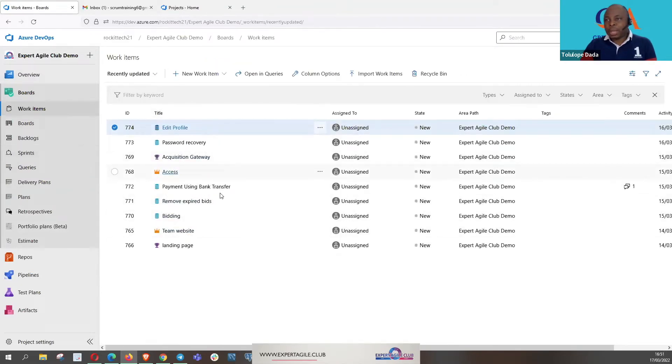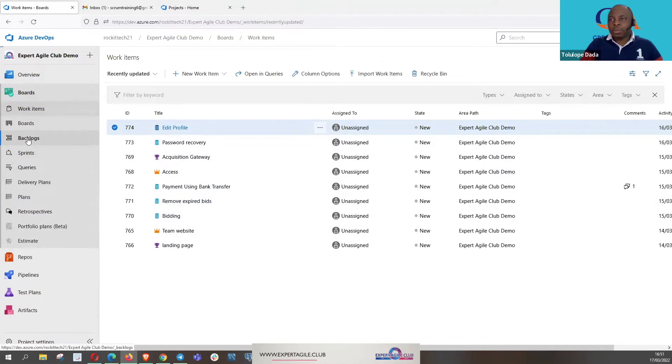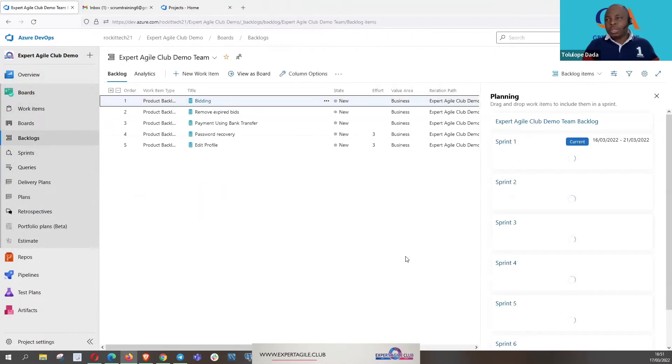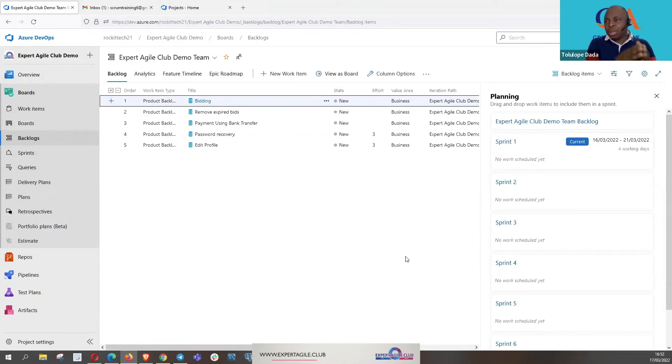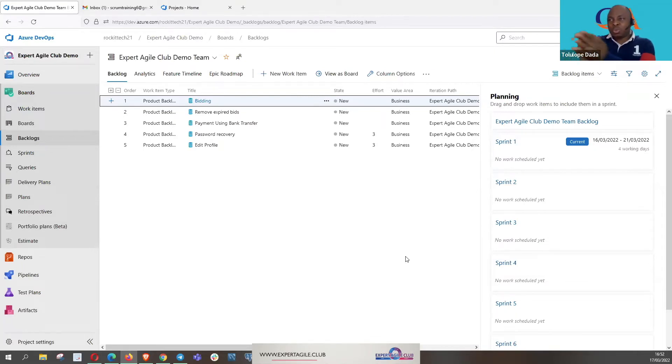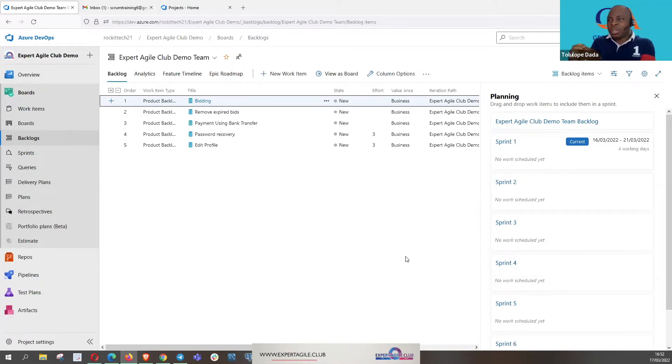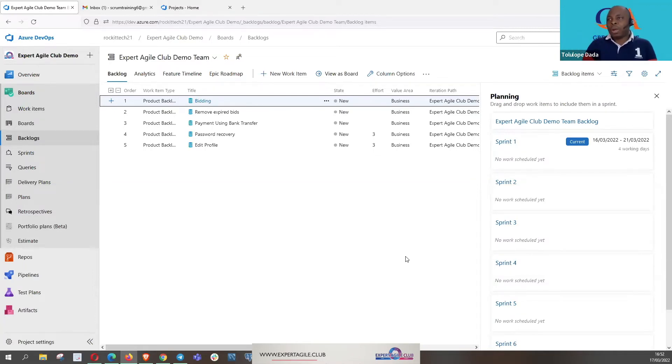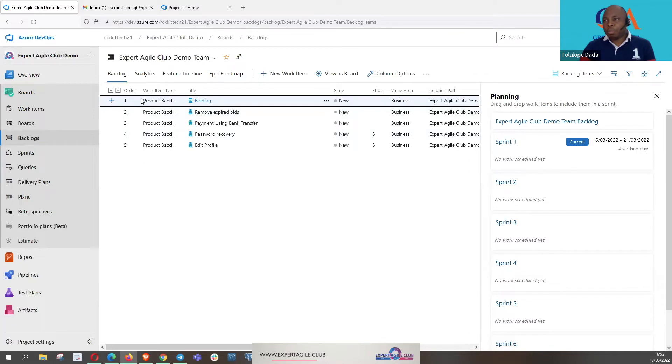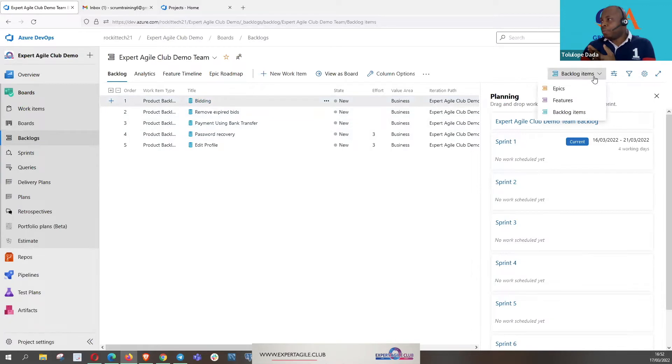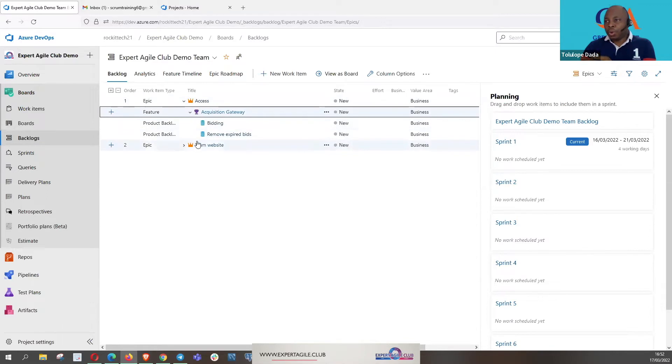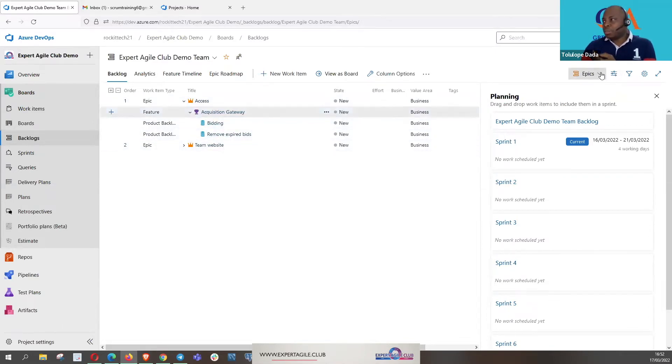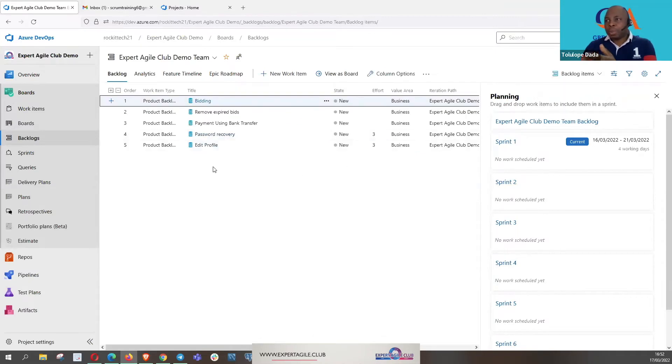These are the backlog items that are created to work with here. Just the same way all the other aspects of sprint planning we carried out, it's just the estimation that is different, not the estimation, the tools that are different, but the same way we have done in Jira is done in Azure DevOps. For Azure DevOps, we are in the backlog now. The tickets are called PBI here. They move from epic to feature to PBI. PBI is the same thing as story in Jira.